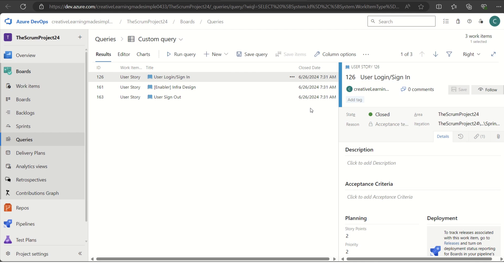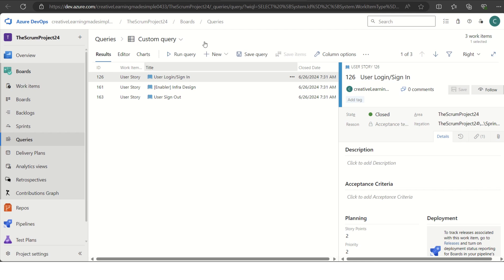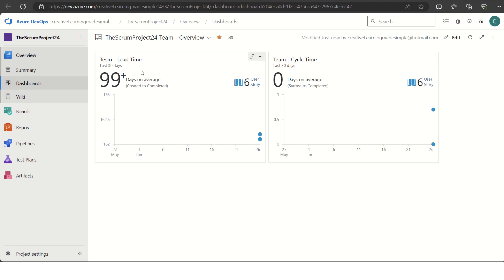Based on these metrics, they will definitely tell us a lot about how much is our lead time. Is it more? Obviously the less is always OK. And how much is our cycle time? Let's say our team is working on two weeks of a sprint, but cycle time is coming around 15 days or 20 days. That means we are either working on very long requirements, very large requirements, very big requirements, or we need to do this exercise of slicing the user story in a shorter form so that the team is able to complete them within the sprint duration. We can definitely utilize as an agile team on the basis of what the lead time tells us about our team's working, what the cycle time tells us about our team's working.